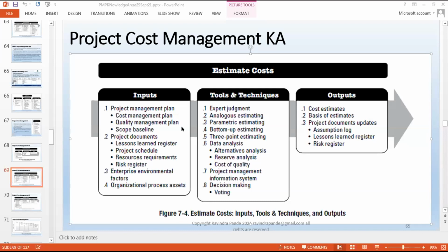Okay, then we have the project information system. This is a typical information system which reports to the top management. So we pull out certain metrics, something like schedule variance, effort variance, cost variance, and so on and so forth. We'll learn these things step by step, but I believe you can understand at least these 3-4 variances we talk about right now. Variance in the sense of whatever you have planned and whatever actually happened, and the difference between that. So this is the variance we normally talk about.